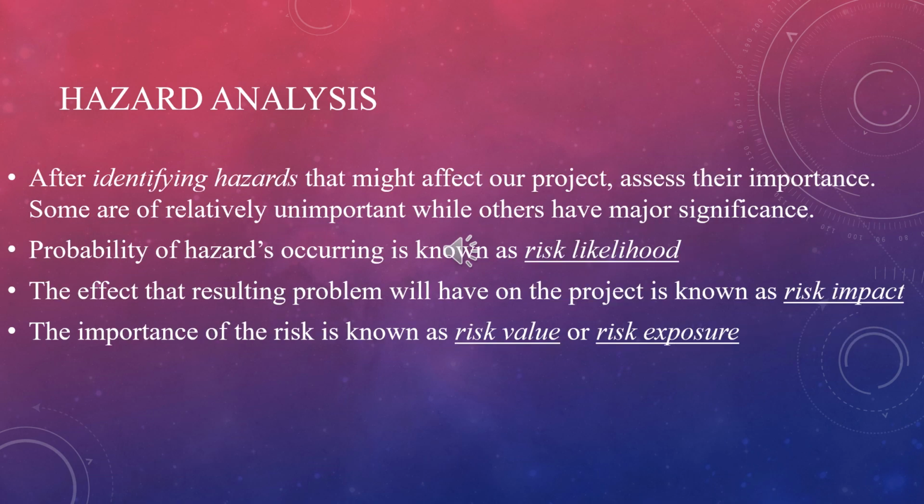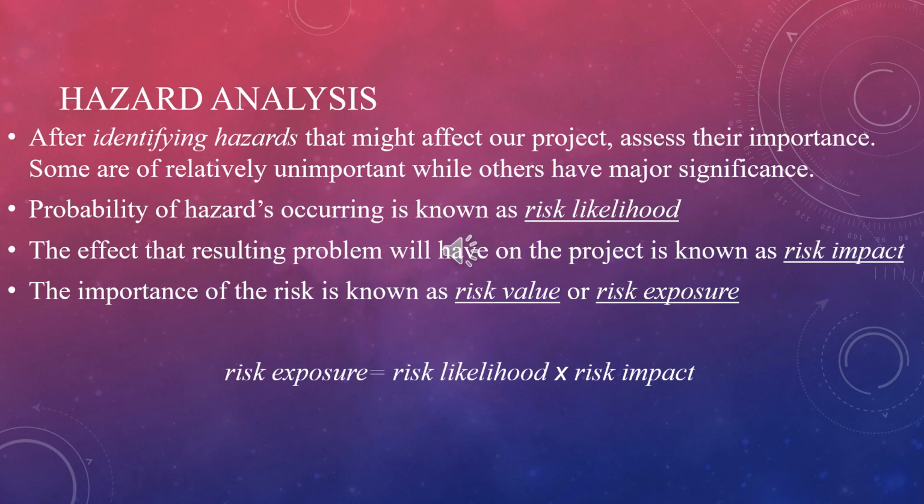The importance of the risk is known as risk value or risk exposure. The risk value is calculated as risk exposure equals risk likelihood times risk impact.